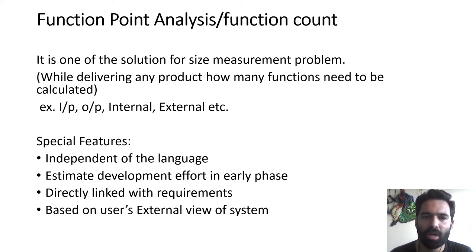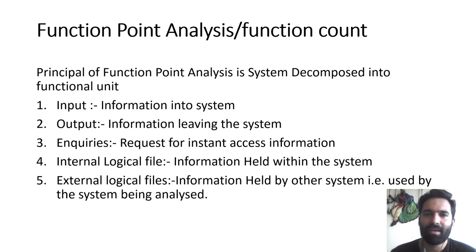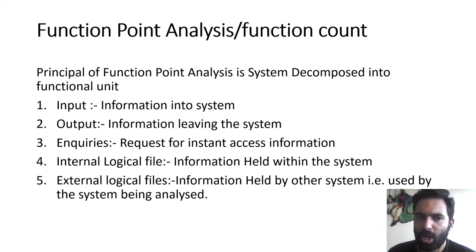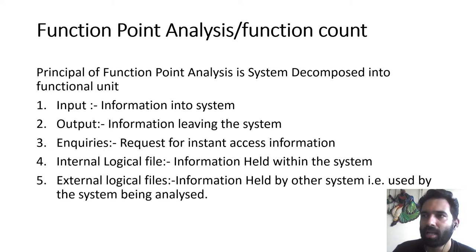Function point analysis is directly linked with the requirements. Unless we link features or function points to individual requirements, we cannot complete the particular task. It is based on the user's external view of the system — how the system is going to perform and what the output will be. The system is decomposed into functional units: input, output, inquiries, internal logical files, and external logical files. For example, in client-server communication, if a client sends a request and acknowledgement comes from the server, a communication channel is created.